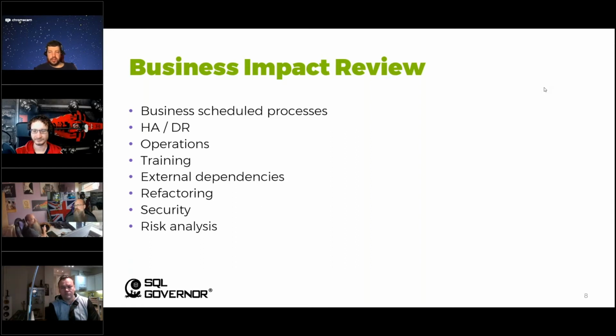You know, we're in that state where we've got a business that relies on Black Friday, well, they might throughout the year only be able to accept a 30-minute outage to their main sales system. So that's something that you need to know right now here at this business impact review stage, not 3 months down the line when you're thinking about how you're going to implement it, because then you're going to have to start to make challenges.